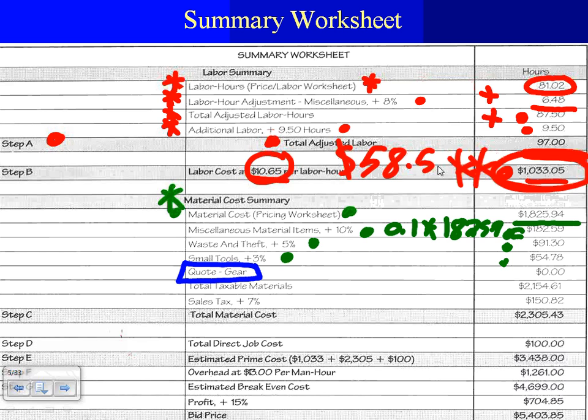Why? Because fixtures are expensive and they could vary from one vendor to another. So you want to take advantage of the bulk. So you quote them. And you always send them to 3 or 4 people to get you the quote, right?